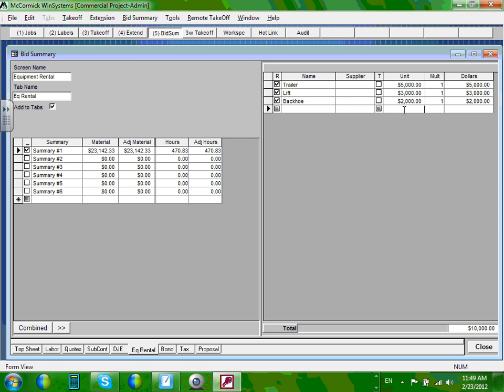Again, this could be 0 if you own the equipment and operate it, or you could rent it. These are for renting equipment to work on this project. If you own the equipment, you maintain it, so then it becomes overhead. You don't put it here. These are just equipment that you rent. You can adjust this one if you own them. There are many ways of doing it, but I wouldn't put them under rent. Rent means rent. If you put it here, it's rent.